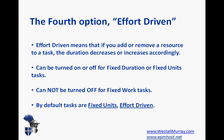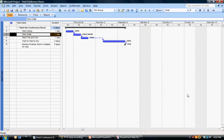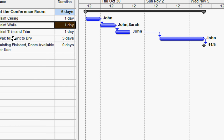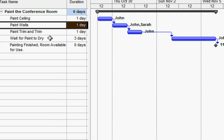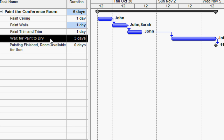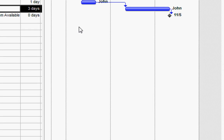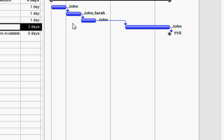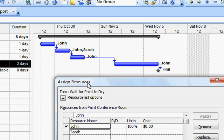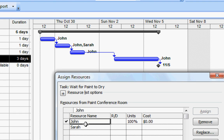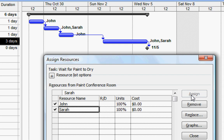So let's take a look at Project again to see how we can change something and the impact it has. Let's zoom in and look at this three-day task — waiting for the paint to dry. If you think about it, it doesn't matter how many people are standing around; the paint is going to take three days to dry regardless. So what we want to do with this task is set it to be fixed duration and turn off effort-driven. When we click OK and add a resource — we'll add Sarah — because we fixed it as fixed duration with effort-driven turned off, we would expect that when we assign Sarah, the duration is not going to change. And indeed, it doesn't.